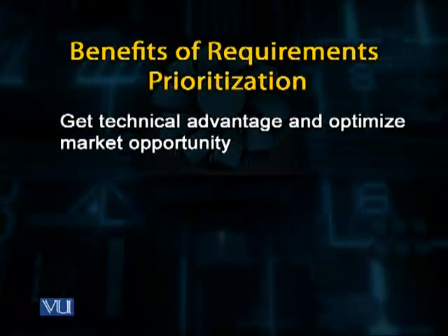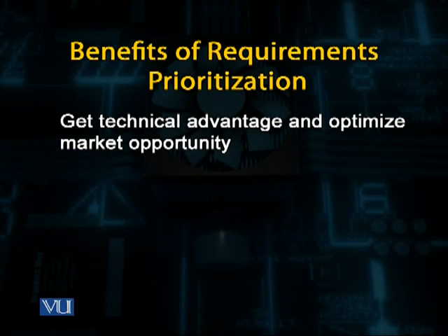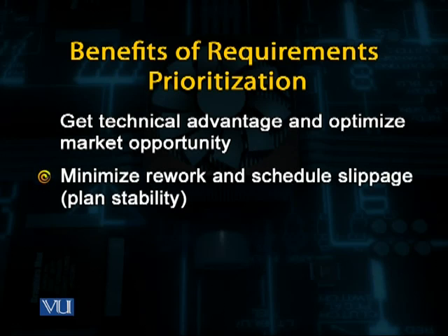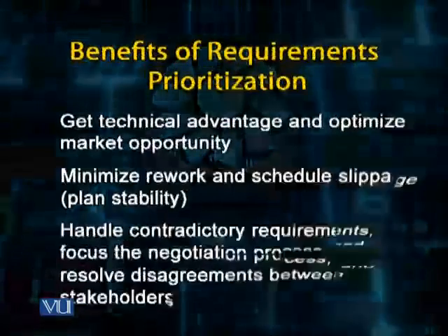We can use prioritization to market the product earlier, and we can have an advantage over the competitors. And this activity also helps us in minimizing reworks and schedule slippages, because we are only focused on a small set of requirements. We are not including the entire candidate pool of requirements. We only select the critical few and then implement them in each iteration.